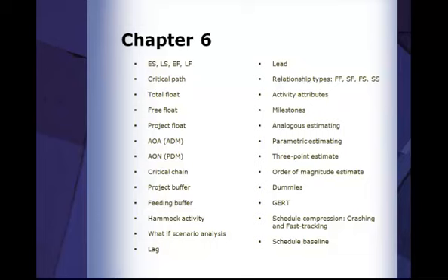Schedule compression, what is it? Understand the difference between crashing and fast tracking. If I'm adding more people to my project, what am I doing? I'm crashing. If I'm adding more time to my project, maybe overtime, I'm crashing. Throwing more resources at my project, I'm crashing. Right? Fast tracking is all about doing things in parallel and doing two activities in parallel.